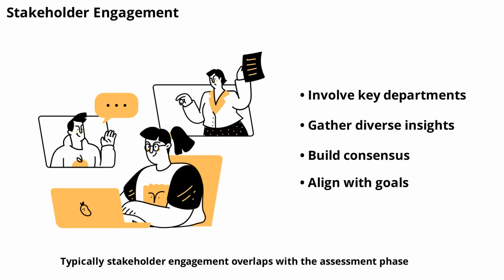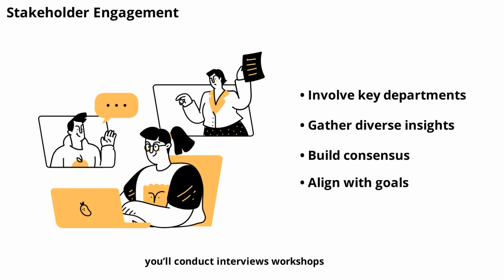Typically, stakeholder engagement overlaps with the assessment phase and can last 2 to 3 weeks. During this period, you'll conduct interviews, workshops, and surveys to gather insights and build consensus. Early buy-in ensures smoother implementation and better alignment with organizational goals.